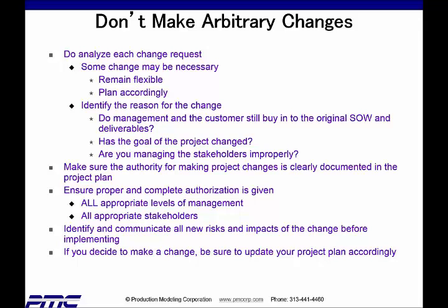Make sure the authority for making project changes is clearly documented in the project plan. Ensure proper and complete authorization is given, from all appropriate levels of management and all appropriate stakeholders. Identify and communicate all new risks and impacts of the change before you implement. If you decide to make a change, be sure to update the project plan accordingly.